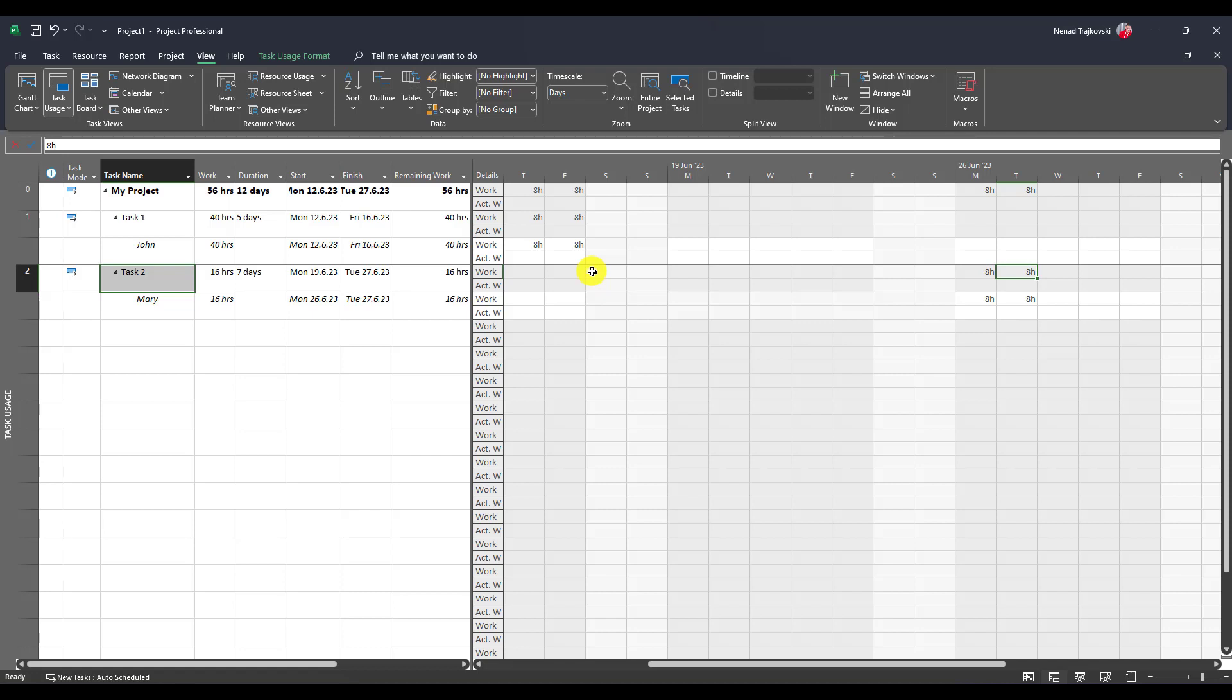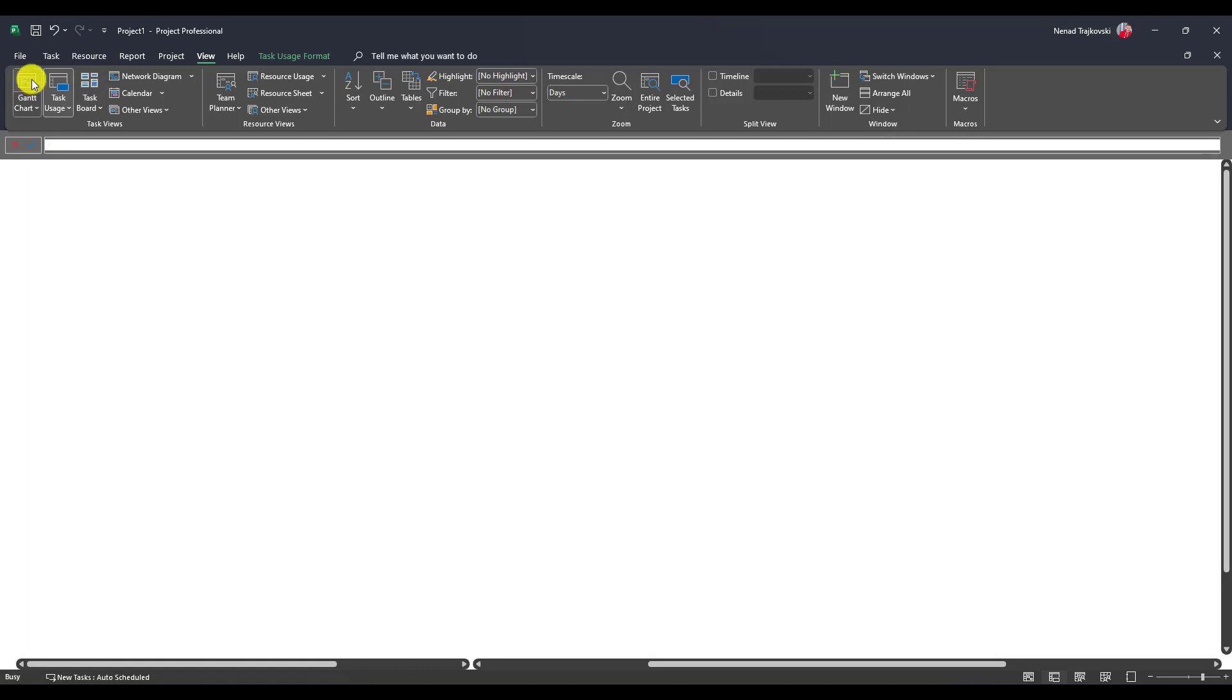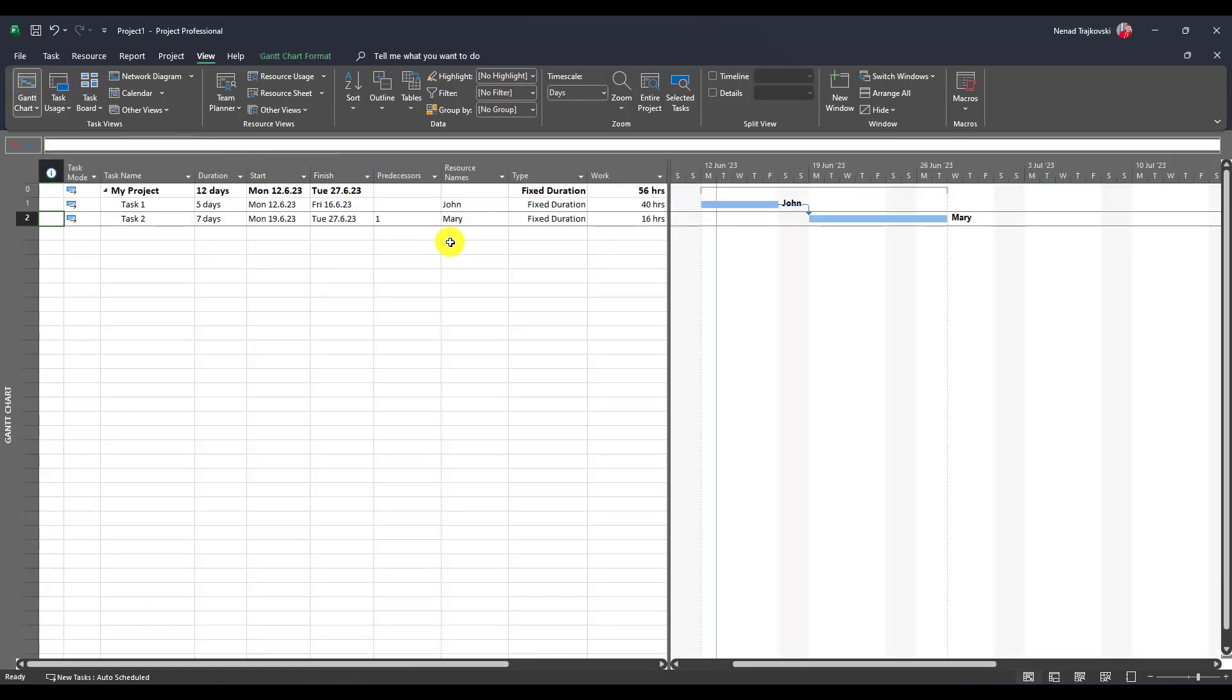She is going to work seven days in duration, but in real life she is going to work only two days because she is off five days. Back to Gantt chart, back to five days here.